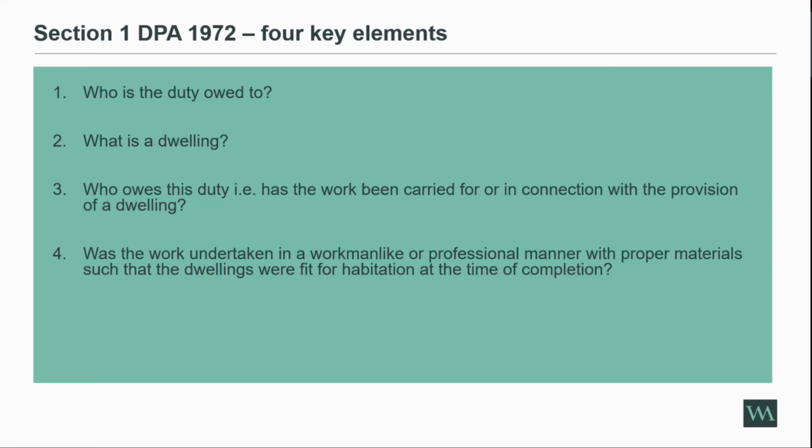And just on another example, which isn't fire safety related, if something causes a serious inconvenience, that can also make a dwelling unfit for habitation. So the example I have is if you have a lift in a tower block that was really poorly installed and it was regularly breaking down, the apartments on the top floor are likely to be unfit for habitation because that's a serious inconvenience, particularly if, for example, it was a disabled person living there, then obviously the dwelling wouldn't be fit for habitation for all types of people.